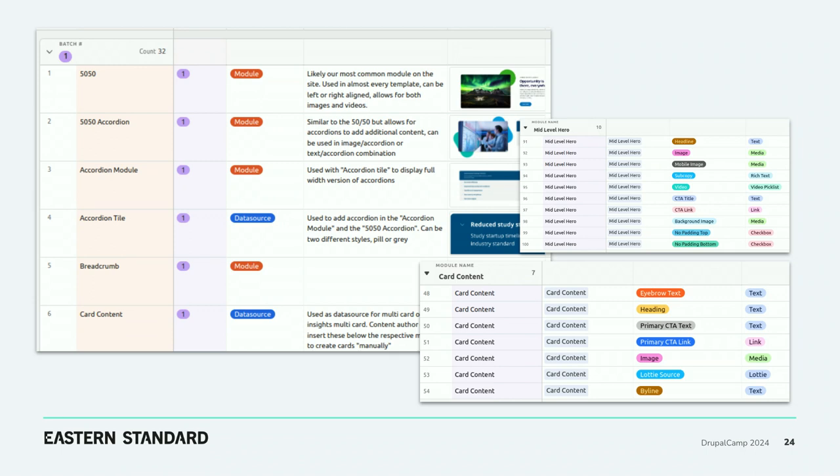We do our designs and feature sets. We're saying we're going to do these six components. We're going to wireframe. We're going to design them. We're going to get feedback on them. We're going to work with them. Then we're going to start documenting them. And then as they're being documented, the next set is being wireframed.